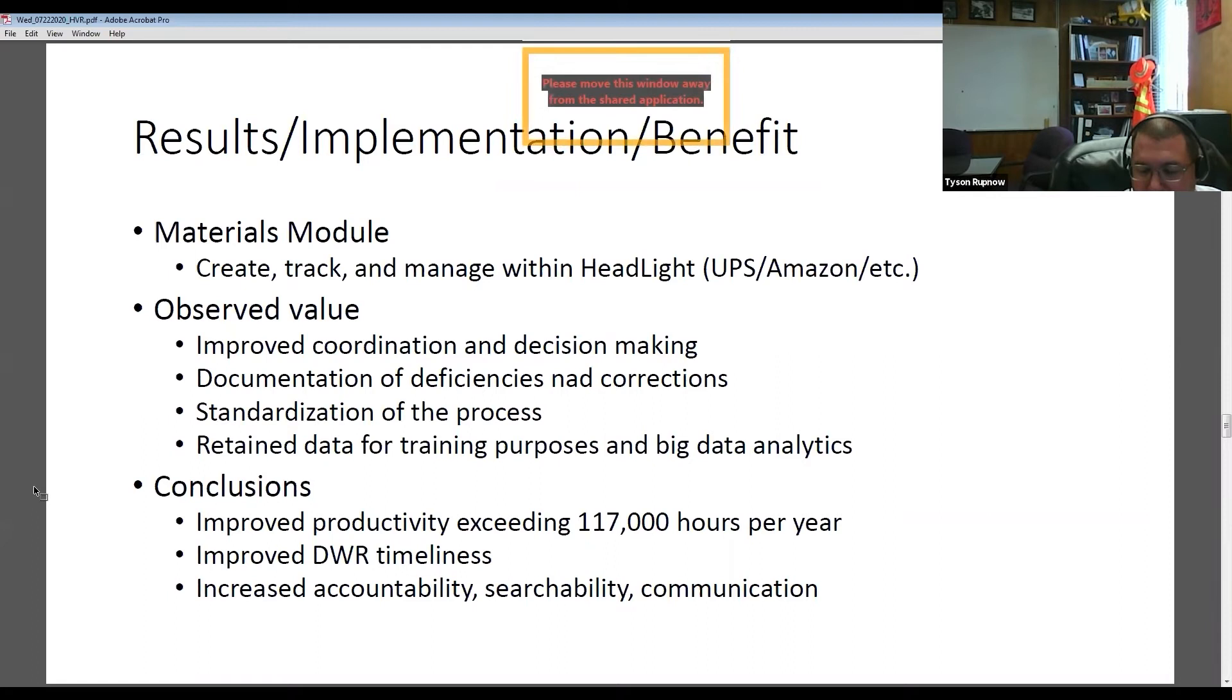We've retained data for training purposes and big data analytics. Training purposes—turnover is a big deal here with a lot of people retiring. We can actually take the videos and inspection photos and show new people and bring them up to speed a lot faster on the proper way to install a pipe or what a sidewalk placement should look like. With big data analytics, we can look at where all of our change orders are coming from—is it a specific bid item or a specific design item? Are we doing something wrong in design or bidding purposes that we can correct to reduce change orders?